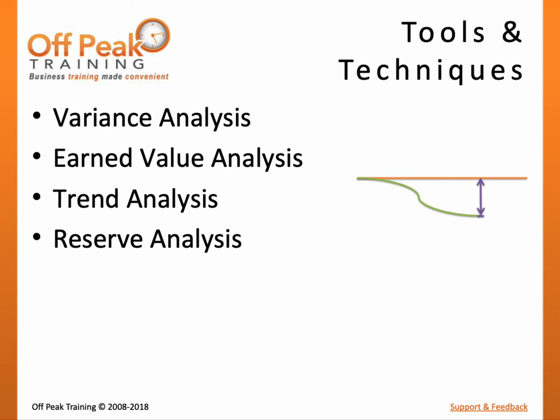If it is evident that a risk event will not occur, the associated contingency reserve may be removed from the cost baseline. If unidentified risks occur affecting cost performance, the project management team may make a formal request to have the management reserves added to the baseline.